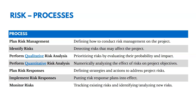We perform qualitative analysis, which is prioritizing risks by evaluating their probability and impact. Then we perform quantitative risk analysis — numerically analyzing the effects of risks, such as specific dollar impacts or impacts in days. Then we plan risk responses, defining strategies and actions to address identified risks. In executing, we implement risk response plans, and then we monitor risks over time, tracking existing risks and identifying and analyzing new ones.